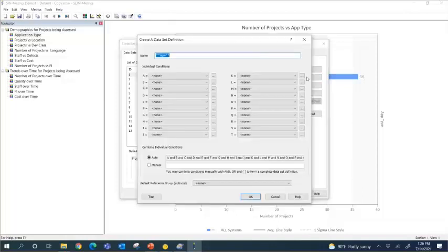I'm going to say new here, and let's work with the business database from QSM, that industry database. I'm just going to say, let's take a look at some of the business apps. Here's where I would have the option to break this out into different characteristics. I could look at all the business applications that get done in 6 months, that are within $1 million, that had a PI of 40 or 30 or lower, or 20 or higher. So I can break out those parameters based on whatever I'd like to see. But for this demonstration, let's start here.